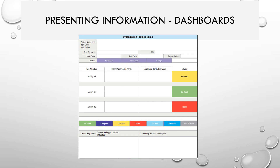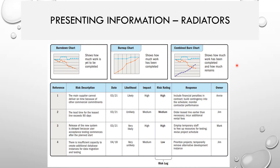The next function of the measurement performance domain is how to present the information. There are a number of ways. Most organizations follow a dashboard approach — one example shows all activities as green, yellow, or red. It includes high-level project information such as executive sponsor, start and end dates, current risks, and key issues. It's a simple dashboard showing how the project is progressing compared to baseline.